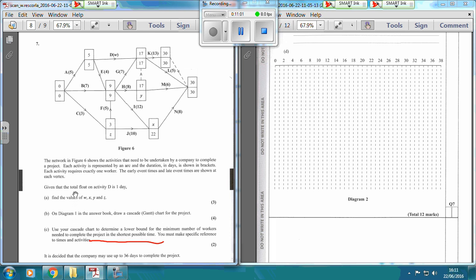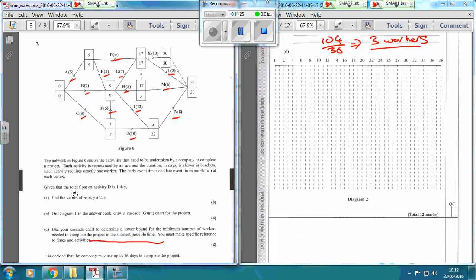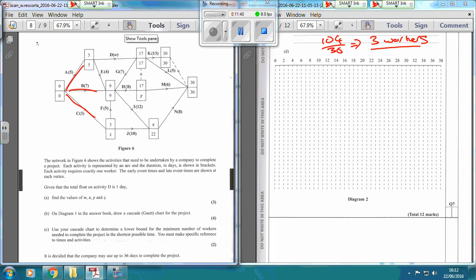So we add up all the activities: 5 plus 7 plus 3 plus 11 plus 4 plus 7, 8, 10, 12, 5, 8, 6, and 5, giving us 104. Dividing that by 36 and rounding up gives 3 workers. So the 3 workers start with A going up to 5, B going to 7, and C going to 3.